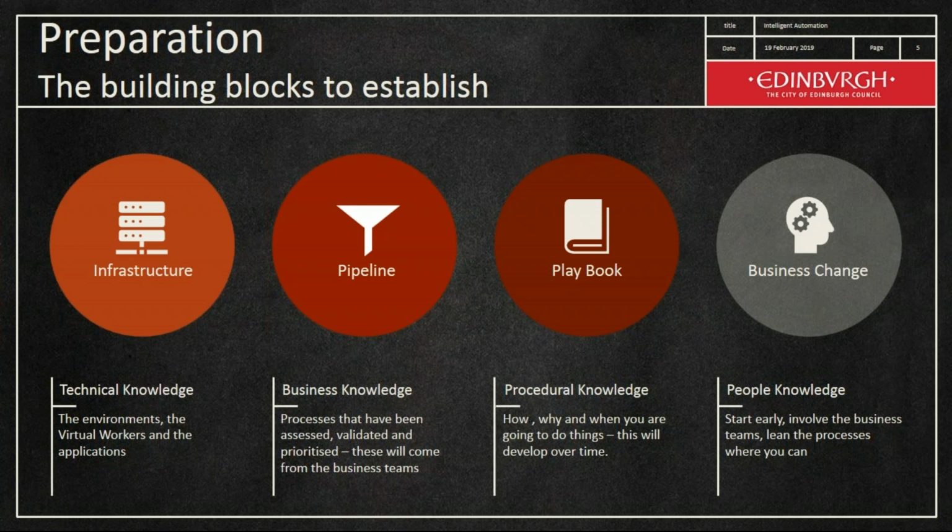You also want to make sure that your IT provider and the application providers are in sync. What you don't want to end up with is an empty warehouse, essentially a brand new infrastructure with no business applications. Also be aware that your application installs may take a lot longer than you expected due to procedural delays or security concerns. Basically, your intelligent automation team and infrastructure will amass a far greater access portfolio than any other part of your organization, so expect a high degree of scrutiny and the associated timescales with that.